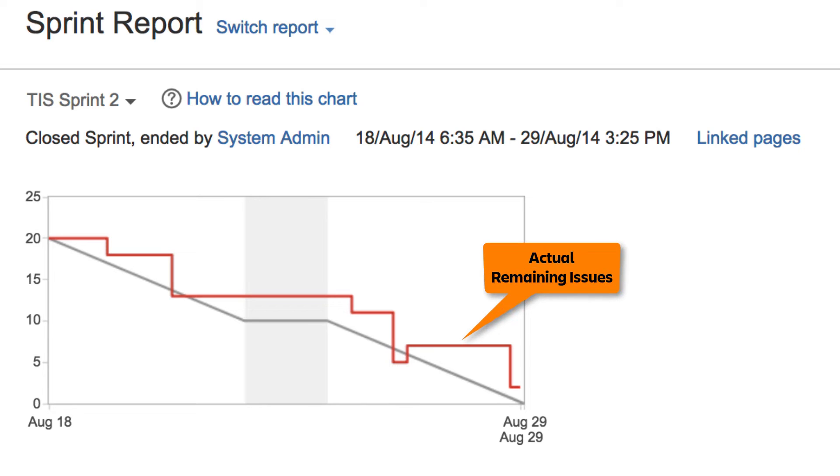The red line shows the actual progress of the Sprint as issues are completed and represents the number of issues remaining in the Sprint.